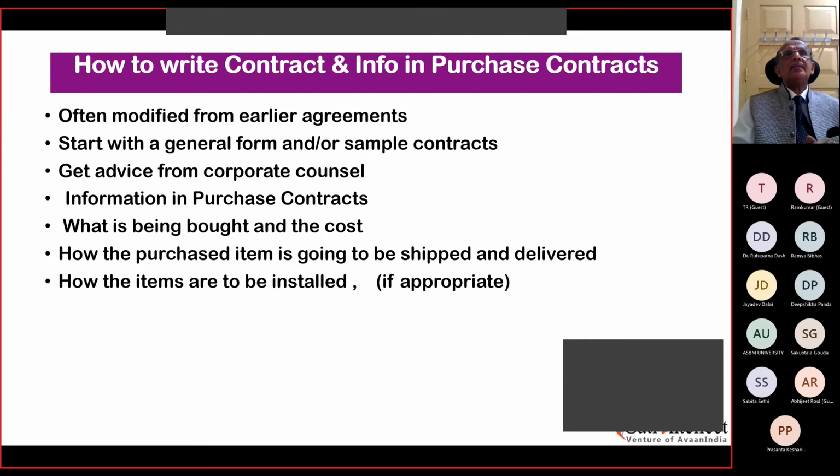Mind you, let's say these are 200 tons of material, like a turbine. These go on hydraulic trailers from the port, taken on direct delivery from the ship and carried to the job site. So the terms and conditions of the contract are that it should always be delivered to the foundation.